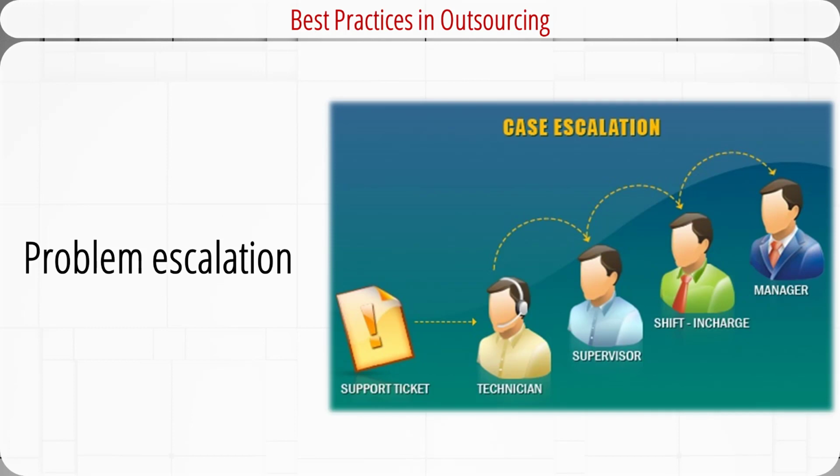Escalation is a primary control mechanism for dealing with and resolving problems. The basic principle is that problems should be resolved at the lowest level within a set time limit, say 24 hours. Otherwise, they will be escalated to the next higher level of management. This policy contributes to quick problem solving and discourages delaying decisions. Management discourages subordinates from passing up problems that the subordinates should have resolved.